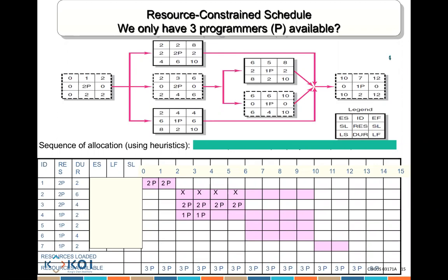The problem with splitting the task a lot of the time is it actually increases your time instead of decreasing it. Because you're splitting it into 1 piece versus another piece, you could be better off using the resources fully on something you can complete than using them on something that is going to be split and won't be completed.